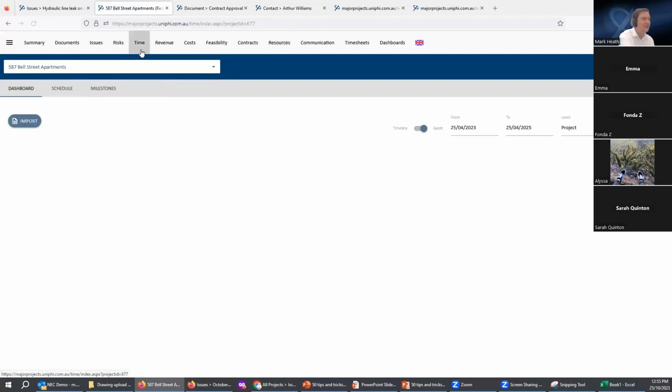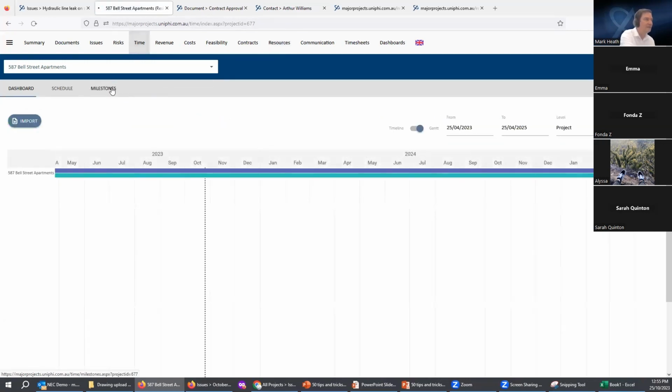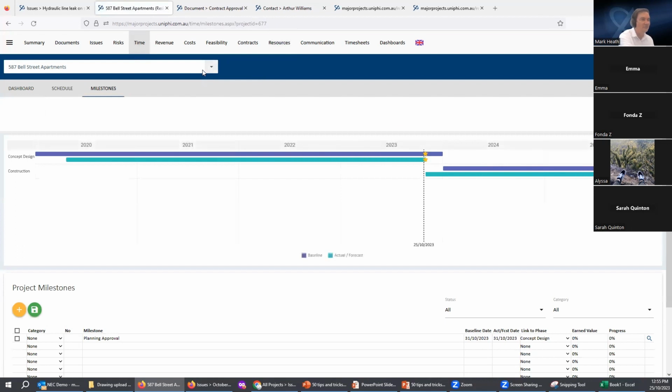There's two methodologies for capturing earned value. They all happen in the milestones or the contracts module. In here, you'll see an earned value percentage for a milestone. Let's say it's 100%, and then your progress towards completing it. Let's say I put 10% there and I hit save.